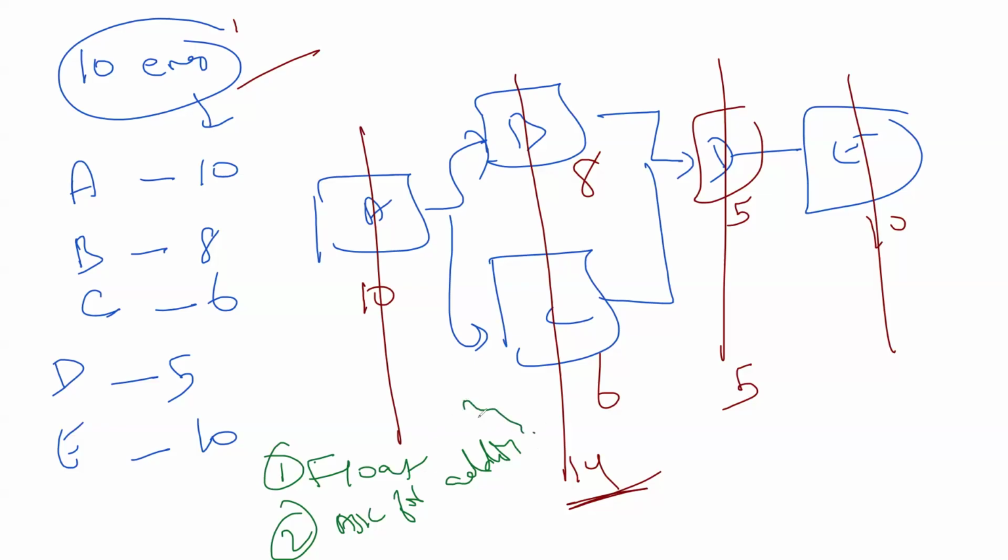So third option is delay. So I tried my float, not working. I asked for additional resources, not working. So what I'll do is C after B, and then this is not a major problem. We can bring more resources, more activities, and make those resources busy.